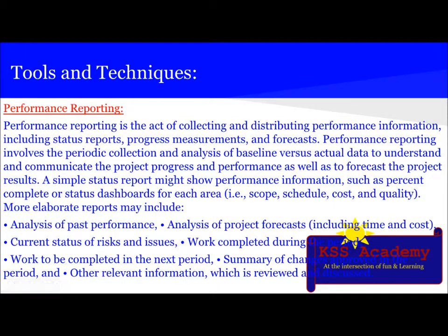The next technique is performance reporting. Performance reporting is the act of collecting and distributing performance information, including status reports, progress measurements, and forecasts. Performance reporting involves the periodic collection and analysis of baseline versus actual data to understand and communicate the project progress and performance, as well as to forecast the project results.